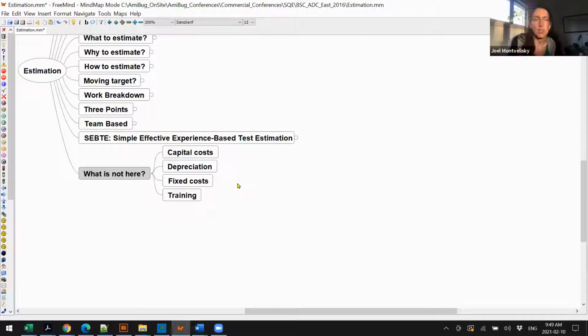Yes, first of all, there's a type of testing that's been popularized since the late 1990s called session-based testing. So session-based testing is a way to organize testing. And what you do is you give work to a tester, you give them a task or a chunk, any way you break up the work, I don't care how you break up the work, and you give them a charter, a statement of what the work is, and then you ask them to test, and they test chunks of time, which are called sessions. Sessions are time boxed, just like a sprint is time boxed in Scrum. Typical sessions are 90 minutes to 2 hours.